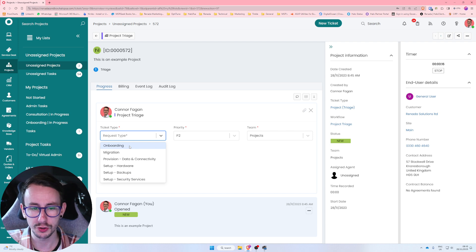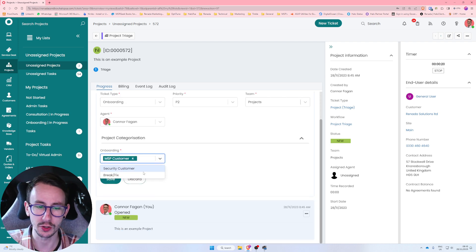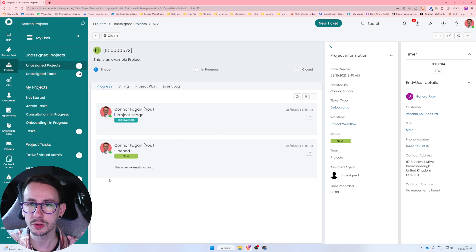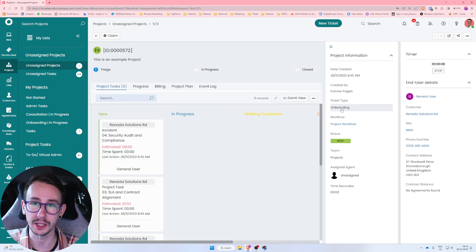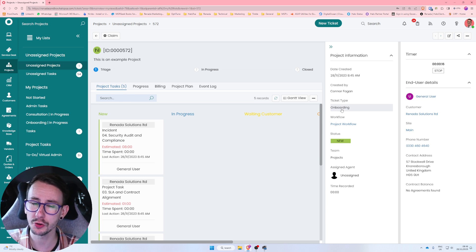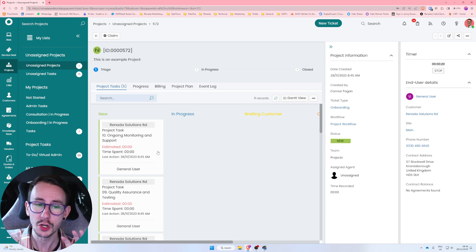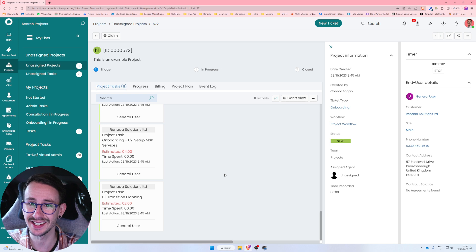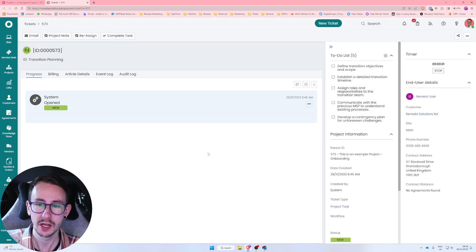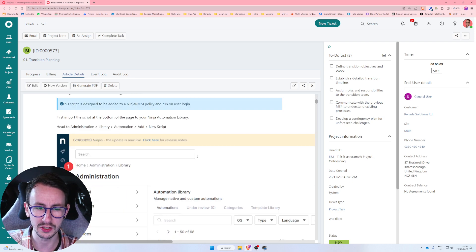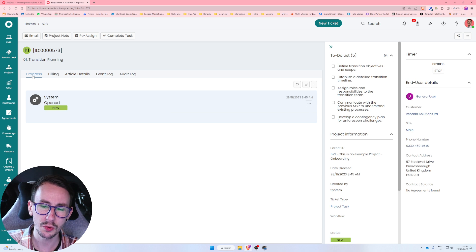I'm going to select this is an onboarding project for an MSP customer and press save. That project is now triaged. What's happening is that's now going to apply a template to the ticket type 'onboarding', and because I selected 'MSP customer' it's going to apply defaults or rules to that project so it knows what tasks to build out. You can see it's slowly tinkering away, creating a bunch of child tickets — or tasks in projects — with to-do lists defined and knowledge base articles attached.